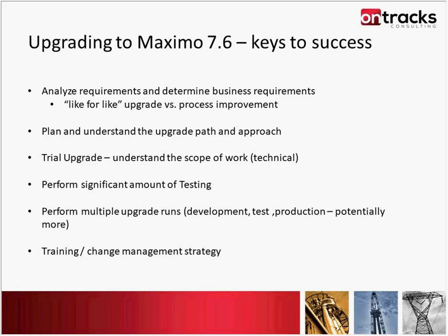You want to make sure you plan and understand the upgrade path and approach. So how many environments do you have? What exactly are the steps? Where's testing taking place? Things like that. Quite often you don't know the scope of work. So making an attempt and doing a trial upgrade really is going to tell you how complex an upgrade this will be. So this is certainly a good task that you can perform. It allows you to see exactly what kind of errors you're going to run into.